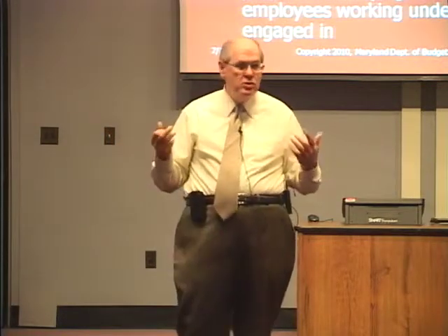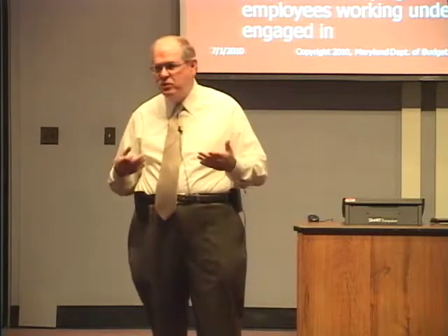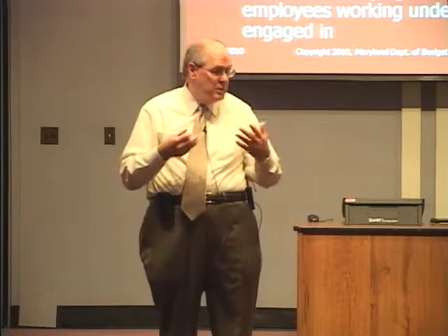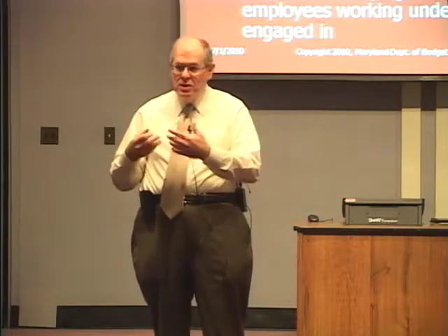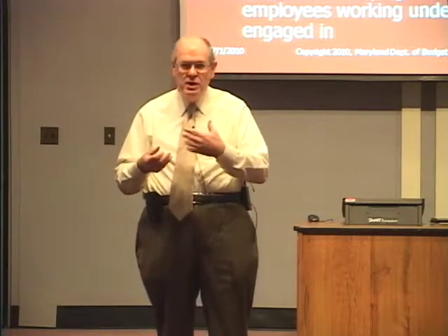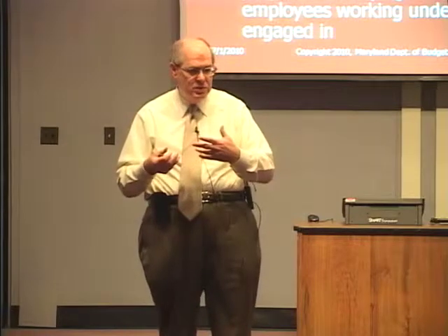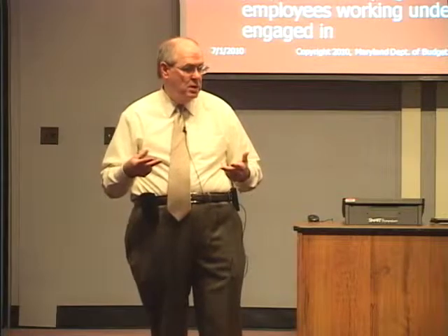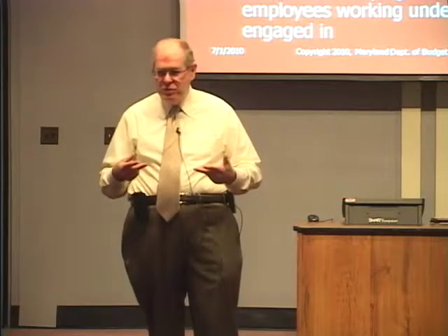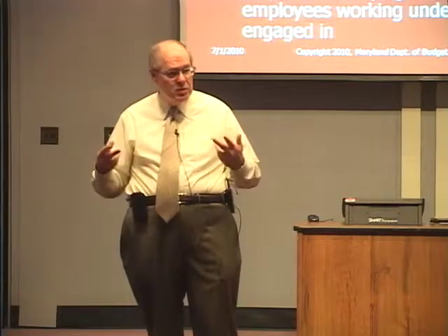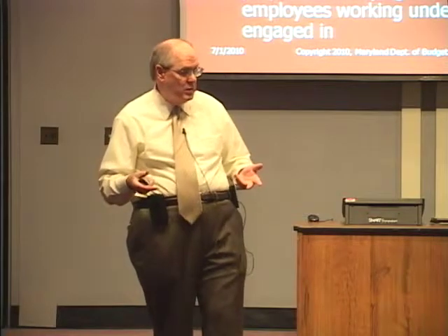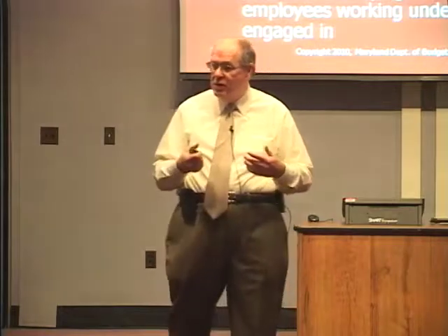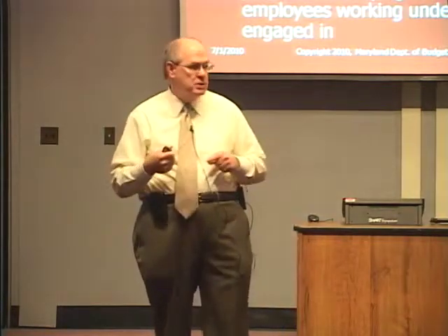Now, is this person going to routinely commit to work 80 hours every week? Or do we have some issue here, that the vendor is listing the same people and is basically going to get paid for that same person under two different contracts, and probably get double paid for the person for some percentage of time? So that's the thing I have remembered for about 20 years now, and I found more than one instance.